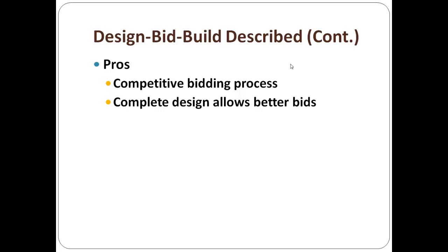The second source he uses will be his books or his computer and the software that helps him in the process of putting together the bid that he's going to give you in hopes of winning the work. He has an estimator, and the estimator sits in a room with his computer and his books, and he is trying to estimate as close as he can what this project is going to cost in the areas of trade, meaning the building, that he doesn't have time or doesn't have a subcontractor who's willing and able to give him a price based on the blueprints during the bidding process.